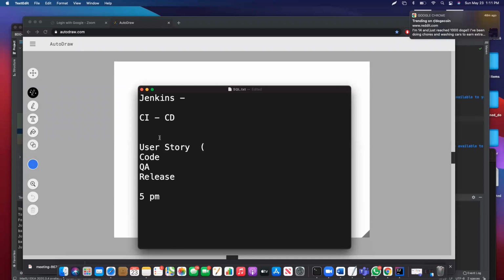And this approach that you are going and taking a story and getting everything through and pushing it when you're ready, that is a Kanban approach. Kanban, right? You guys know what Kanban is. Agile Kanban, right? So that means as things are coming, you as a developer pick that up and code them, and then once you finish coding, QA will do the QA, and then release is happening by the same day. Okay, that's called Kanban approach.